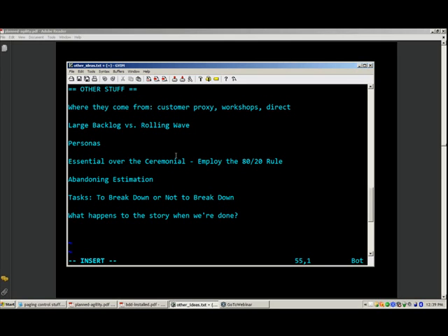Then everyone goes around and we just keep going in circles and say, this has got to be a feature in the system, hold up the card, explain it briefly, and then start piling them. Start aggregating them into piles: these things are similar, these things are similar. The next pass maybe takes half an hour, 40 minutes. The next pass, now start actually harvesting real user stories from those things.